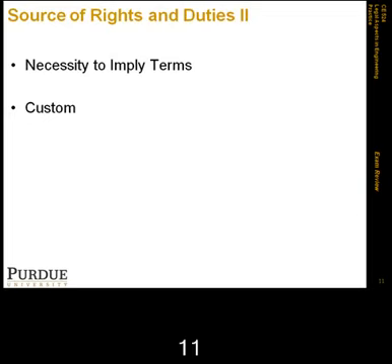Many courts have emphasized custom and customary practice in interpretation of contract language and trying to understand the actual intentions of parties. And sometimes contracting parties may be held to customs even though they are not aware of them, if they should have known them, for example.